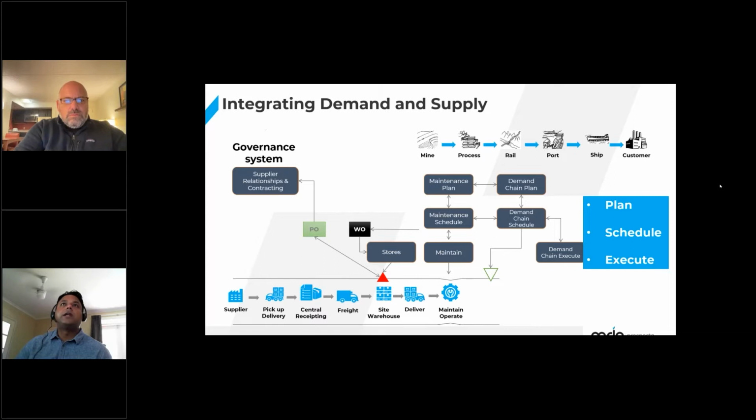Now you see most of the lead times have really shot out. What was available for 30 or 40 days has now been extended out to more than 200 days, especially parts coming out of China, etc. So this allows us to provide that forecast to the suppliers who can then use it for their own planning purposes as well.